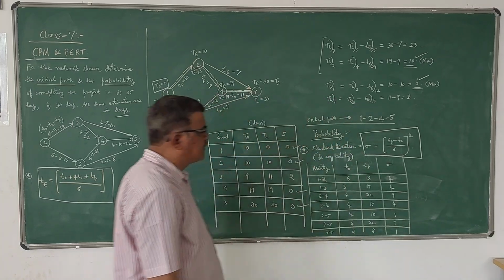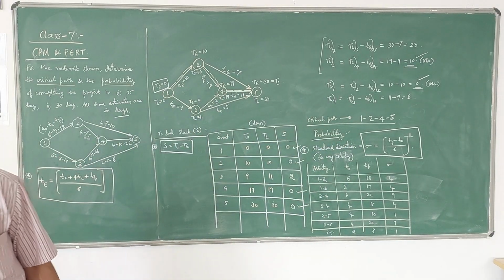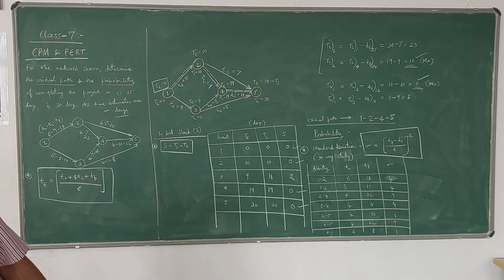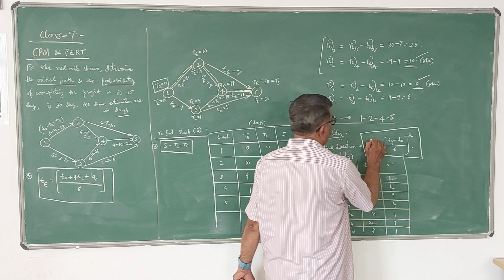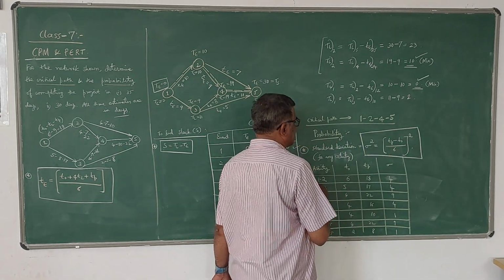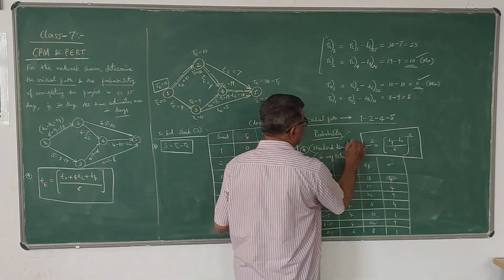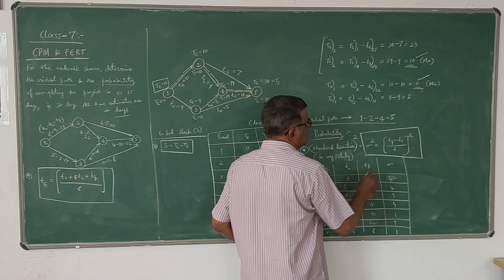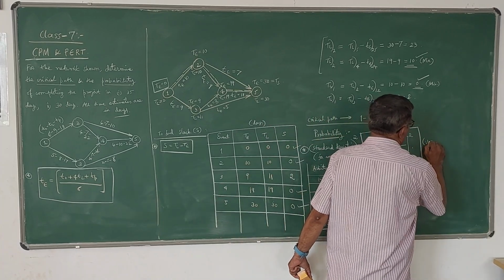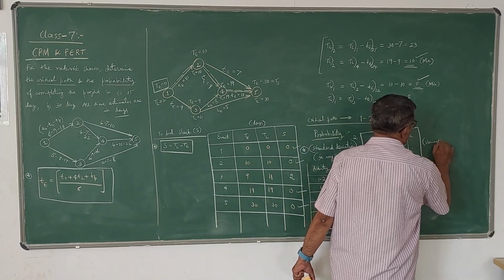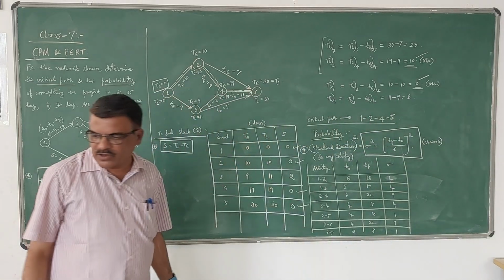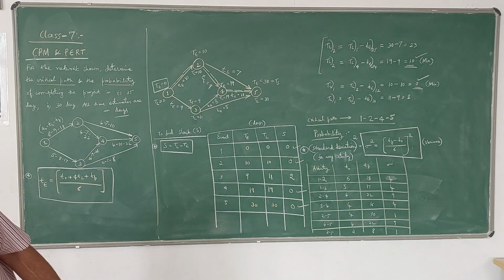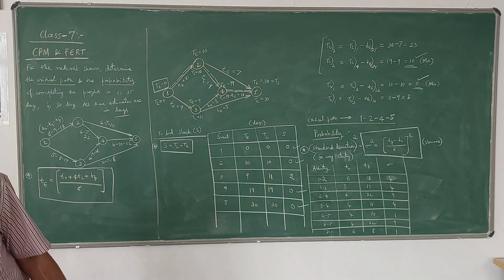I think this is the sigma value. So we got the sigma values now for all these, not sigma square. Actually this is sigma square. That is the variance, the standard deviation squared, which is also called the variance. So sigma square is obtained using this formula.